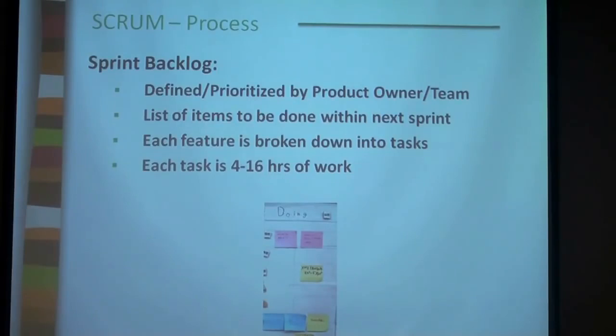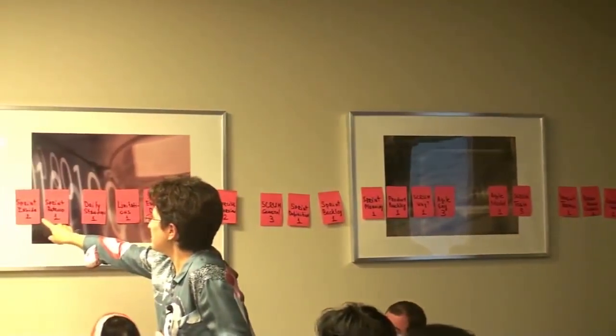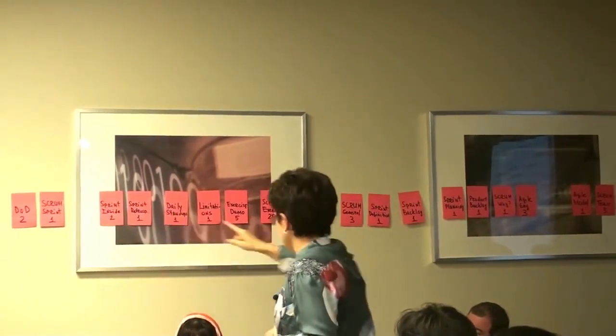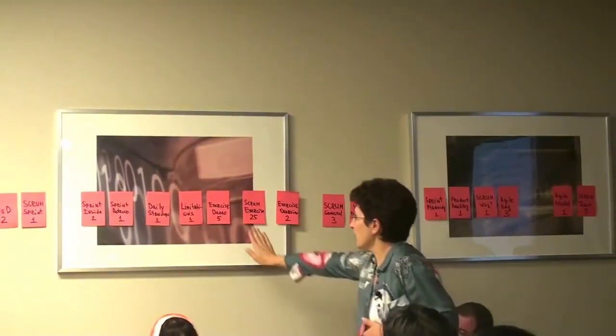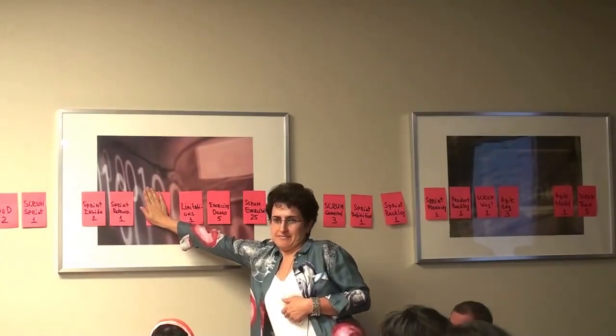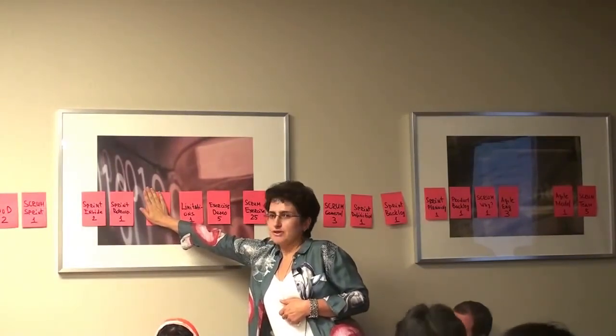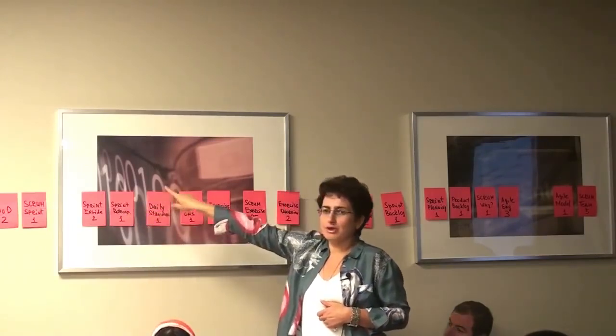We know that in the first sprint, we will have, let's say, 7 work units that we can finish. And a work unit may be 1 day, 2 days, right? So if those are 7 work units, and each digit is 1 work unit, then how much can you do? How much can you do, Michael? So 7 work units, right? So you can do 1, 2, 3, 4, 5, 6, 7. So your sprint would end up here. See? You can do only 7 work units. That means this is how much you can do in your first sprint.